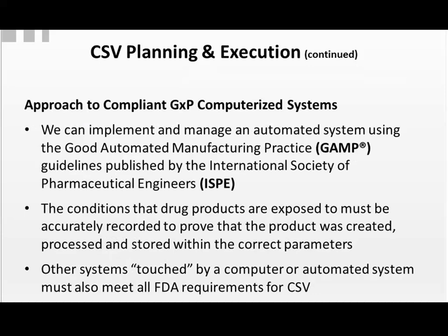In addition to risk, there are several other things to take into account when you're deciding on how to plan your validation testing. And your validation plan is the place where you define that particular approach or rationale. You have to be able to defend that to FDA. In addition to risk, you certainly want to look at size and complexity of the system and the criticality of the particular function to the business.